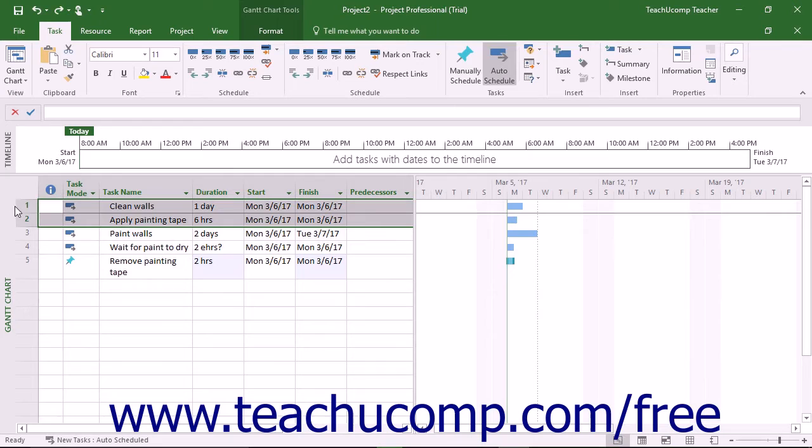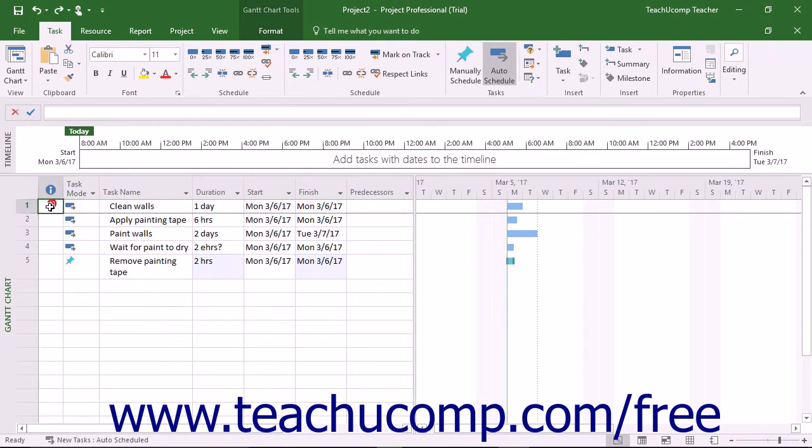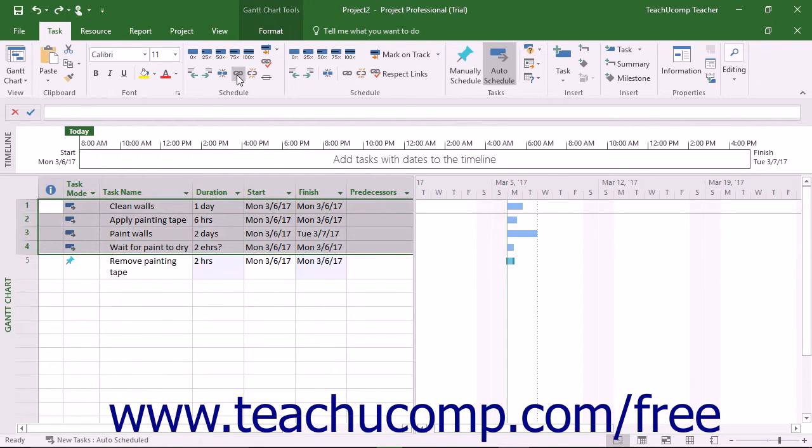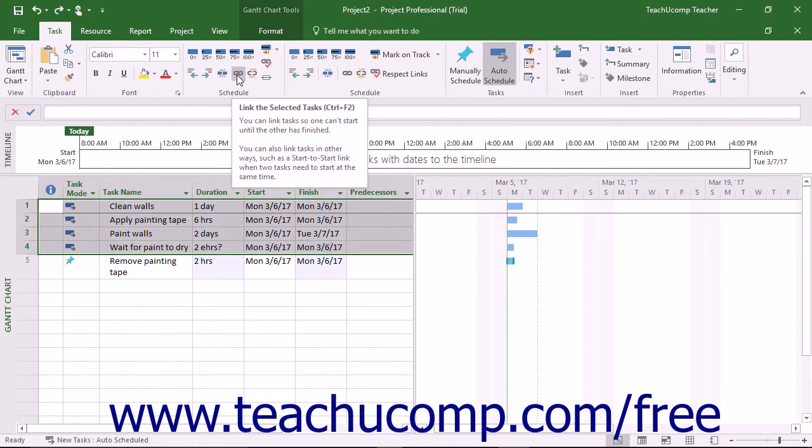To sequentially link multiple tasks with the FS link type, first click and drag over the tasks to link within the task table, and then click the Link Tasks button.